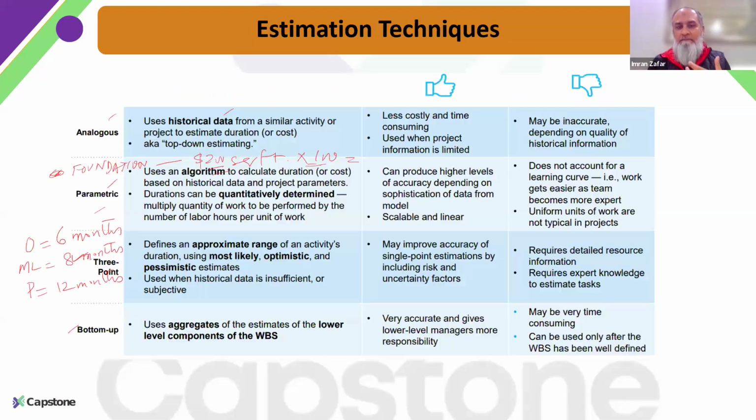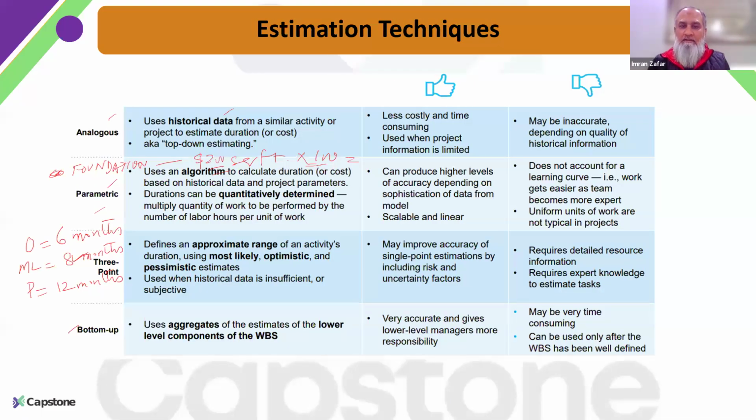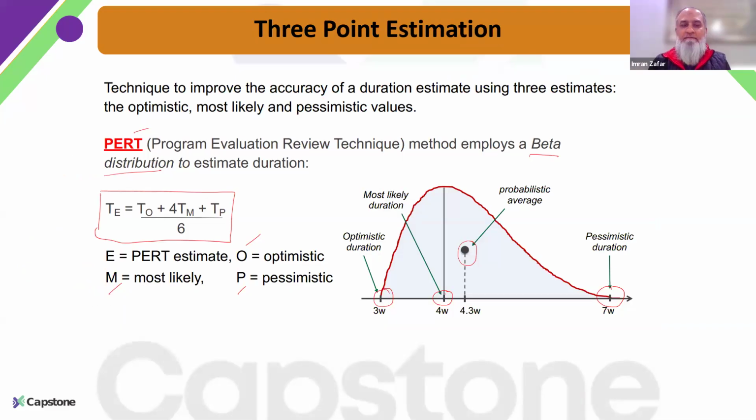But again, the methodology or technique that we are going to follow is documented in our scope management plan. If in our scope management plan we have agreed that we will be utilizing 3-point estimation, then we will be following it for the schedule related part. And these same 4 techniques are utilized in budgeting as well, when we are doing estimation related to the cost part. So we can utilize any of these 4 techniques to develop the budget for our project.